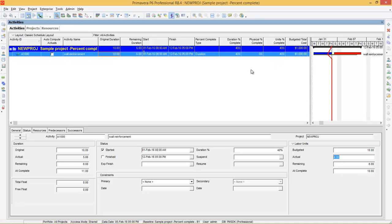You can see unit percentage complete — 40% is calculated from the duration percentage complete. But in real time, as 5 days are over, 5 Masons have already worked. So you need to enter the actual units as 5. Now you can see the unit percentage complete changes to 50%. Physical percentage complete is still 0 because it has no automatic calculation — whatever you enter here will be used as the physical percentage complete. So let's say physical percentage complete is 50%.